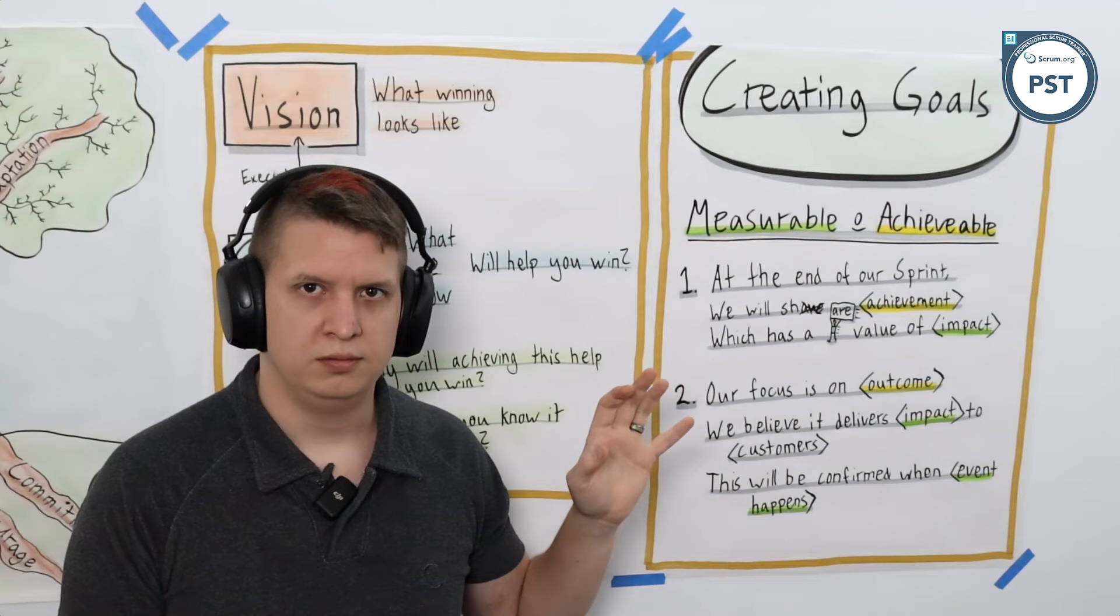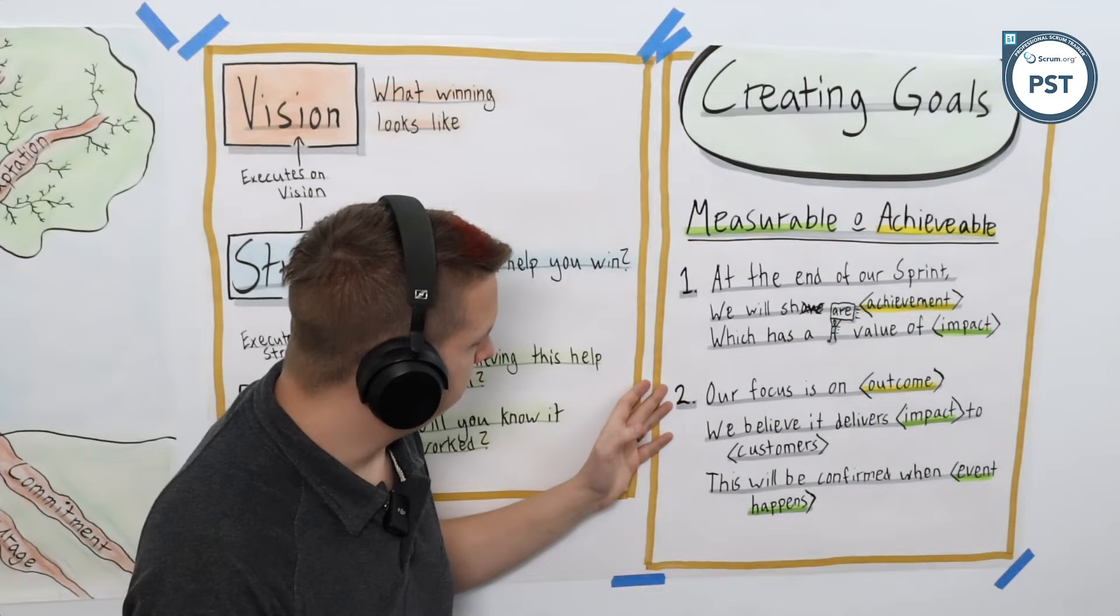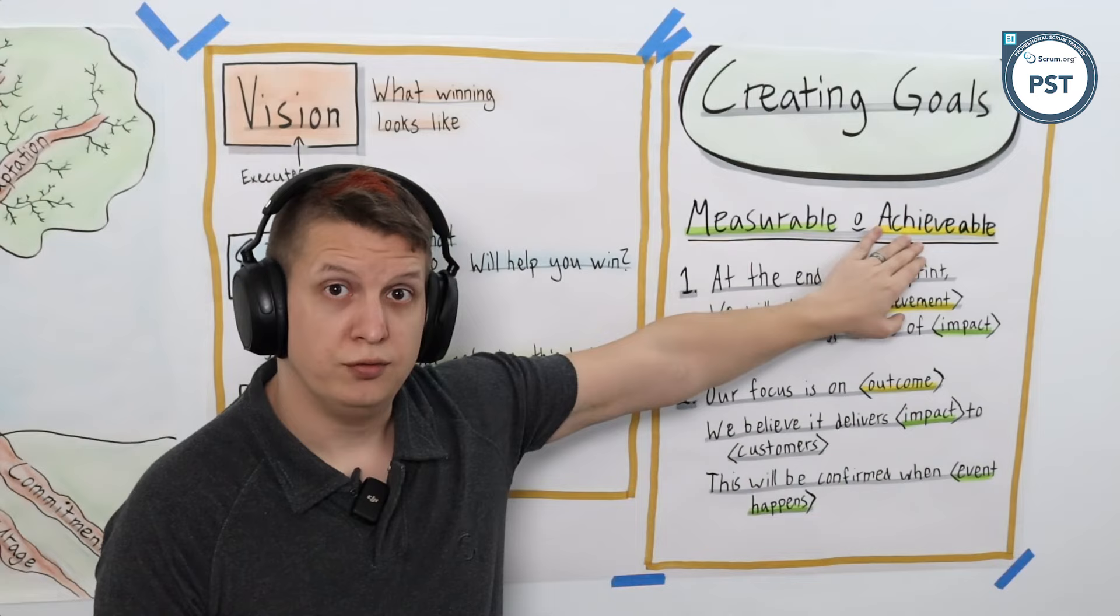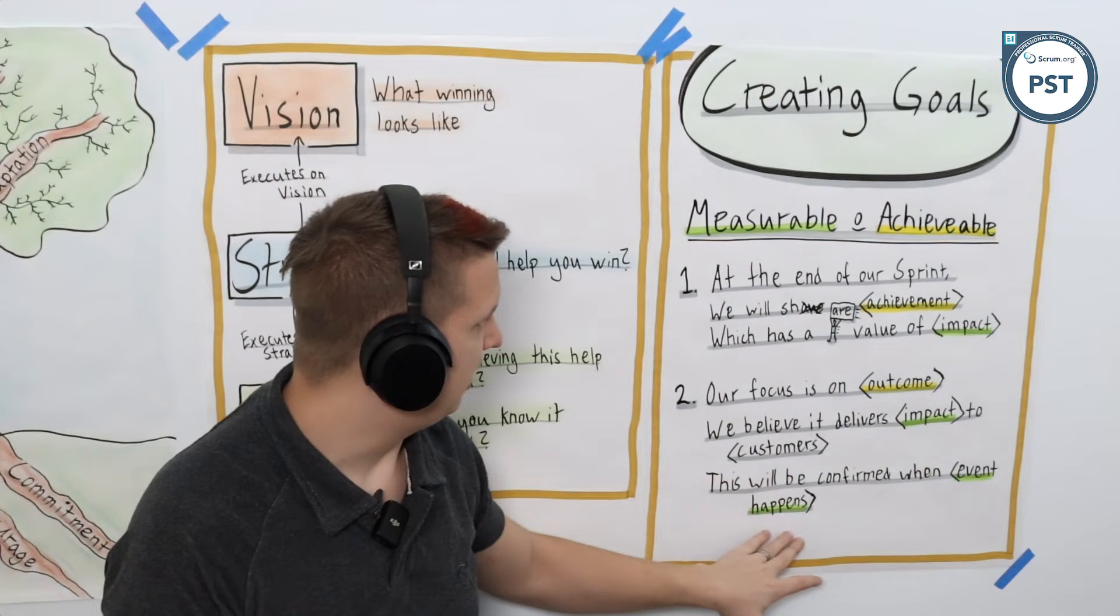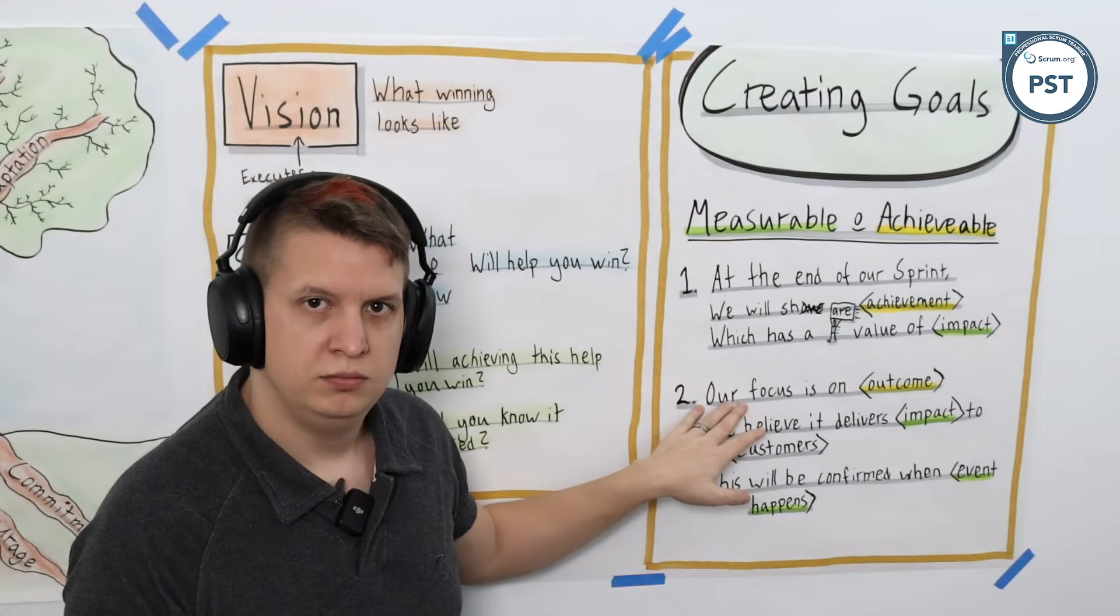The second format is: our focus is an outcome, again achievable, we believe it delivers this impact to customers, and this will be confirmed when this event happens. So both impact and event happens are potentially measurable things.